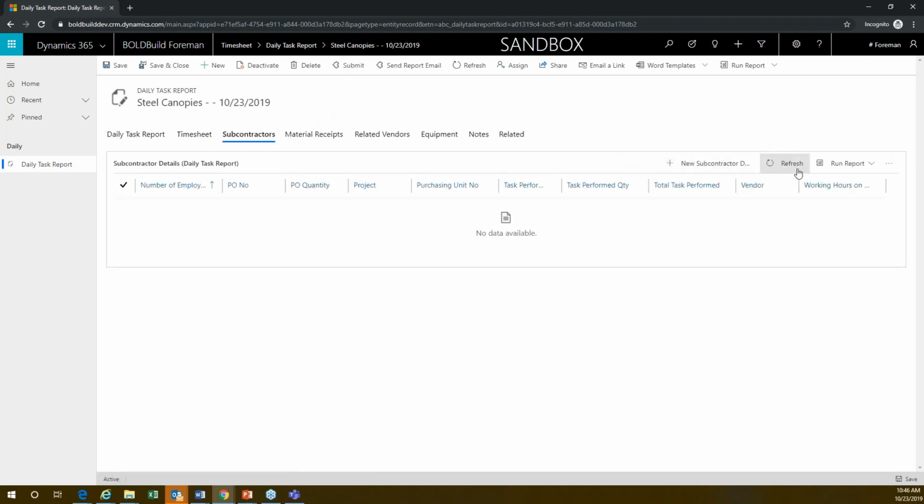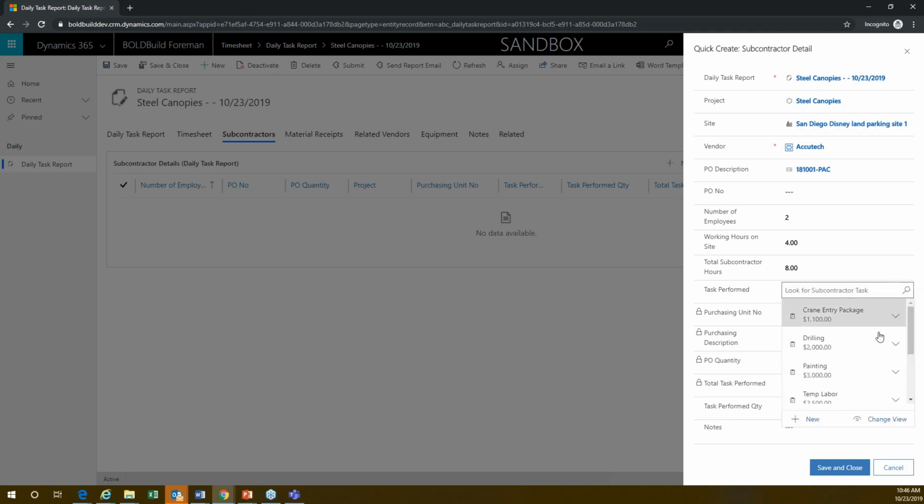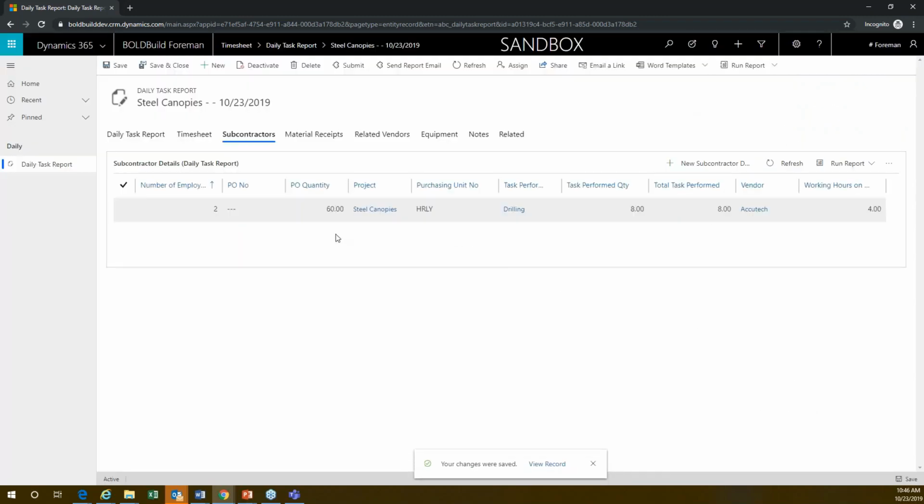But I can also go in and say, oh, I have a subcontractor that is going to be on site. And this subcontractor that I'm going to choose is my vendor. And then I'm going to say the PO. I already have a PO set up for them. I'm going to use this PO in 101, and I said they had 2 people on site, they worked 4 hours each, and I can even specify what task they did. So for example, they were here to help us with drilling. I can choose that, and it tells me that you have 60 hours in the purchase order with them, and I said they were only here for 8 hours for today. So I can save and close that, and it gives me this information.